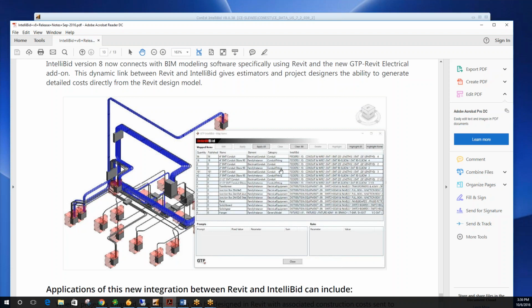And this is really not designed for devices and fixtures. BIM is mostly for your trapeze, your feeders, panels, and that type of stuff. It allows you to just lay it out. You could then send your layout to the architect so that he or she can make sure that all the electrical, mechanical, HVAC, and structure is going to work together, so that you're not running into each other in the field with your design. So that's basically what this will allow you to do.